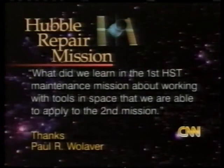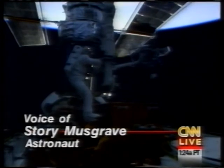Question for Story Musgrave. Two-part question, Story. What did we learn in the first Hubble maintenance mission about working with tools in space that are able to be applied to this mission? I just think we learned the principles of how you do business, how you do spacewalks. KT and I, Tom and Jeff, we looked at essentially, between us, every single on-orbit spacewalk ever done. We tried to extract the lessons learned, how to attack the details in various analog environments such as water, airborne floor, vacuum chambers, clean rooms, real tools to real instruments. And so we went forward with that, how to upfront early attack all the details, choreograph the entire thing. And I think that what we did on STS-82 in November of '93 bore out that is a way to approach things. So I think we developed a principle, a way of doing business that could be applied to this mission and could be applied to Space Station. Hopefully we captured a methodology to go forward with.